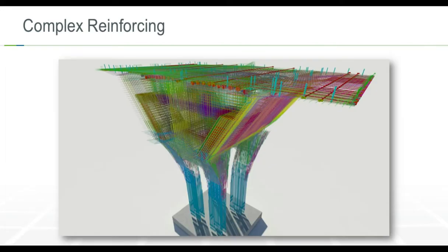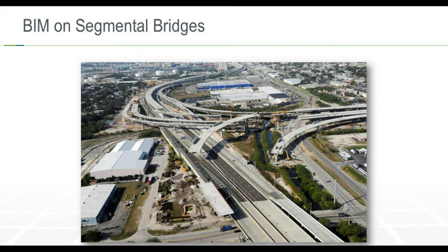This is the pier table for that same job that we actually detailed out in 3D. Real key for us here, coordinating all of the embeds, all of the post-tensioning, making sure it was all going to fit before we went ahead and put anything actually in the field.